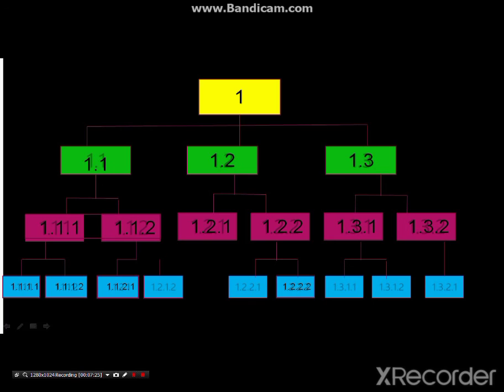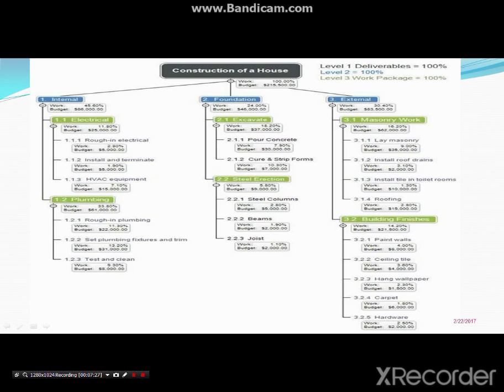Okay, similarly, let's say construction of a house is there. So if I divide the construction of the house into internal, foundation, and external, then this foundation will be, let's say, 2. Okay, so 2 will be divided into 2.1 and 2.2.